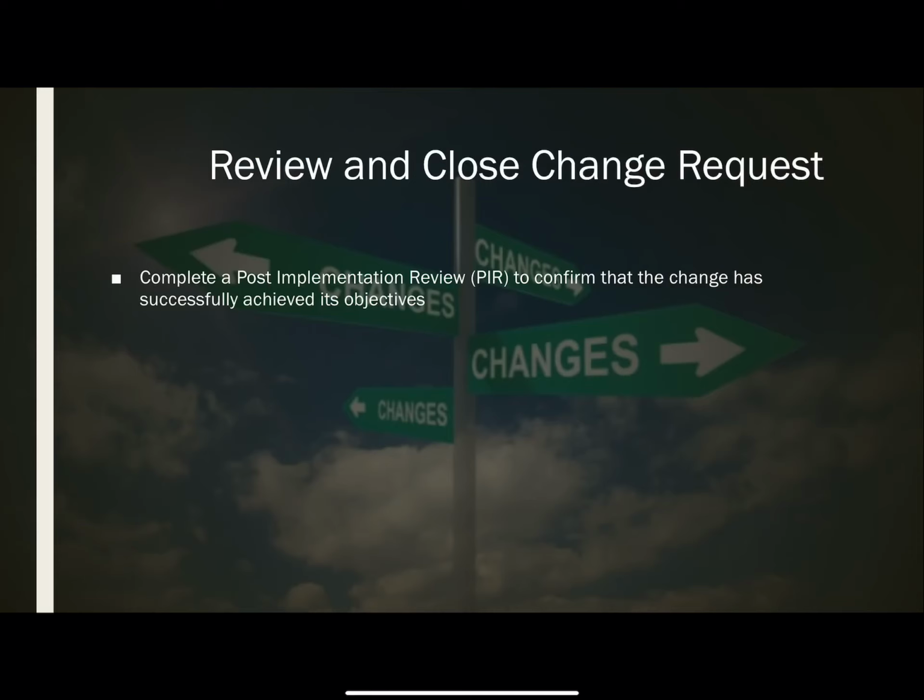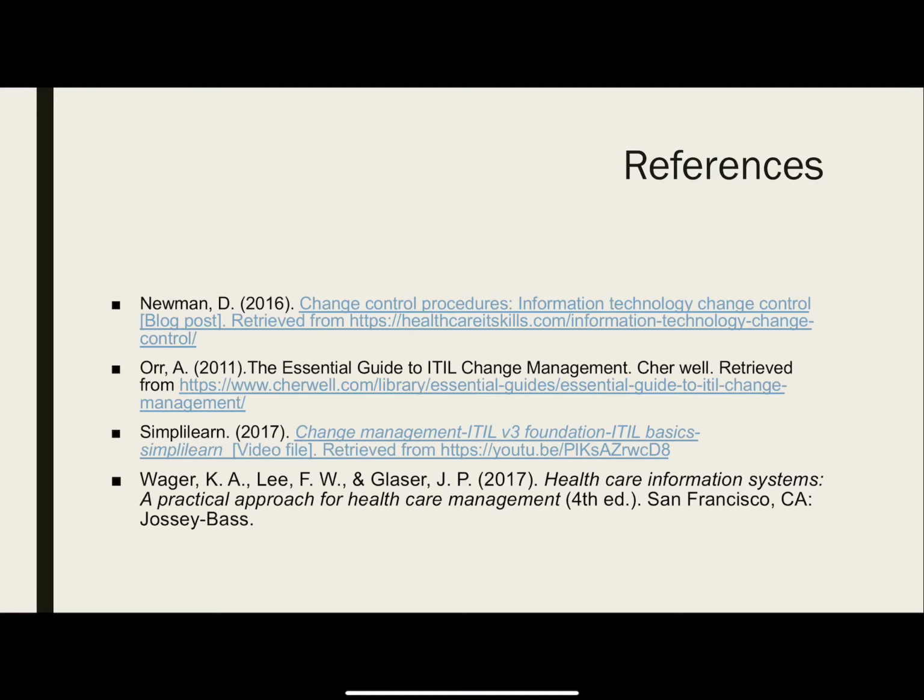Once this is done, you want to review and close the change request. You have to complete a post-implementation review, which is the PIR, to confirm that the change has successfully achieved its objectives. This completes my presentation.